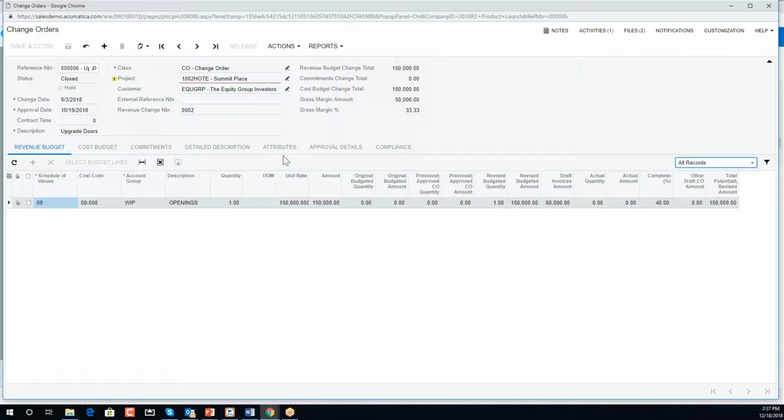So just like the invoice, this particular change order could be on hold, it could be open, different statuses that can be set up for those change orders. There's approval maps and approval settings built right into the Construction Edition, so you can set up all those approval routing and who gets to approve what items, specified by dollar amounts or sizes of change orders or invoices, etc. Lots of flexibility built into the system.